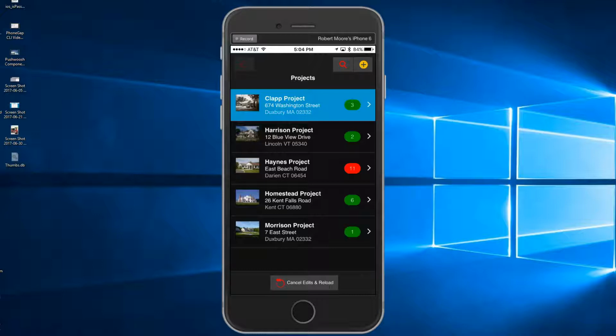The punch list is normally agreed upon by the general contractor, the architect, and the homeowner after a project walkthrough. Many contracts will include a reference to the punch list and typically a percentage of money, normally between 2 and 10% of the total contract cost, is retained until the punch list is completed. The project punch list is a very important part of any large project.